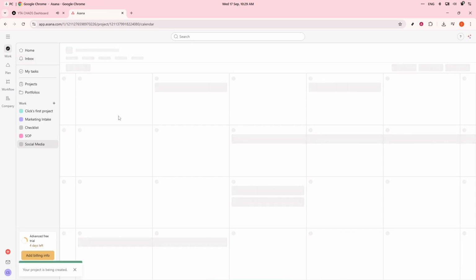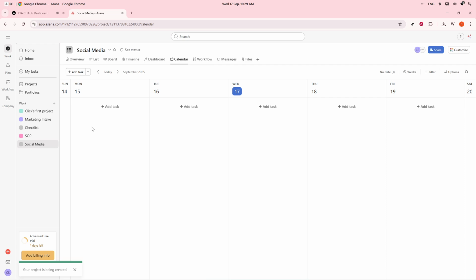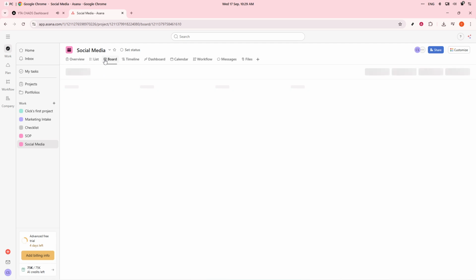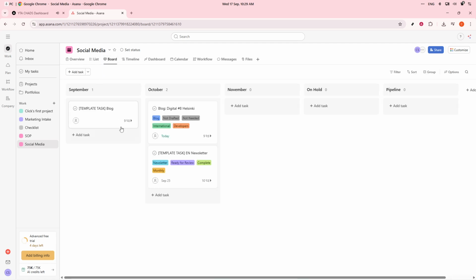Moving on, assigning tasks is the next critical step. Designate specific tasks to content creators, designers, or editors. Additionally, set due dates for drafts, approvals, and publishing to maintain a smooth workflow. By switching to calendar view, you'll be able to see all your posts neatly aligned by date, which aids in maintaining deadlines. For a more detailed workflow, subtasks can be implemented for each main task.